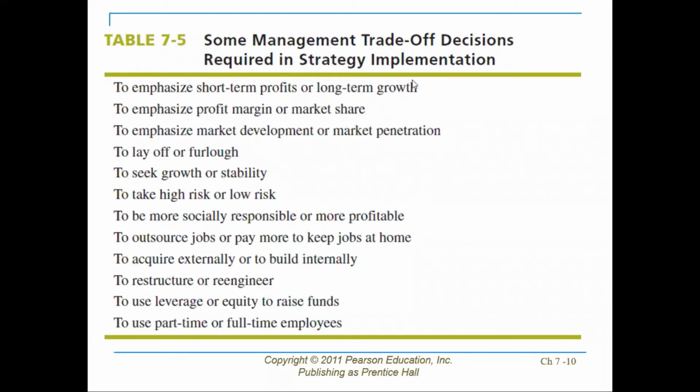Physical resources mean the building, the machineries, the technologies you are using, the vehicle, all these kinds of physical resources. So in the project, we see that the time, the quality, and the cost have a trade-off situation. What does it mean? It means that if you want to lower the cost, then the quality can be compromised. If you want to increase quality, that would carry high cost. And if you want to get your project done well in time, it again puts a question mark on your quality and cost as well. So whenever you are controlling the cost, your quality is going out of control. Whenever you are taking care of the quality, your cost is going out of control. These kinds of situations are called trade-off situations. So you need to have some kind of trade-off decisions as well.